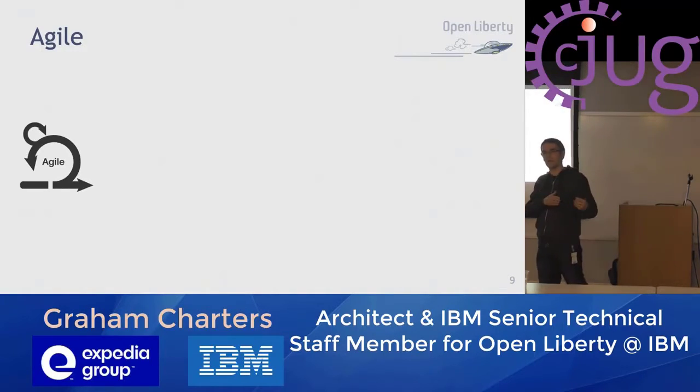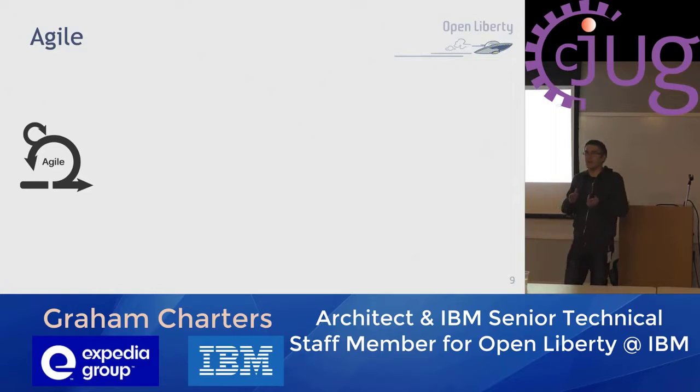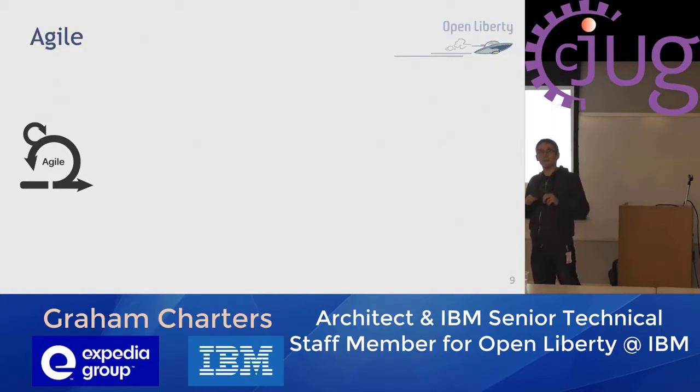And what had happened along the way was, because people knew that the next release cycle was going to be in 2 years' time, they didn't want to miss the current boat. So they would cram things in, and the industry would change, and we'd cram new things in, and we'd get scope creep.